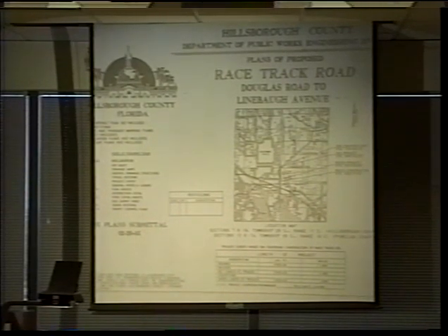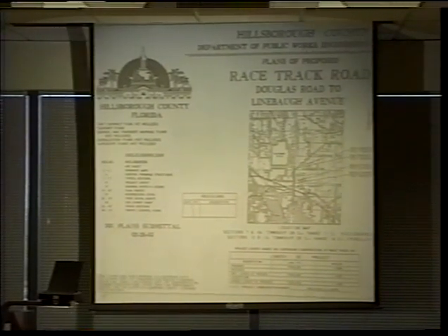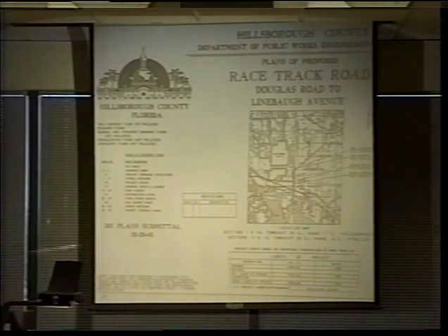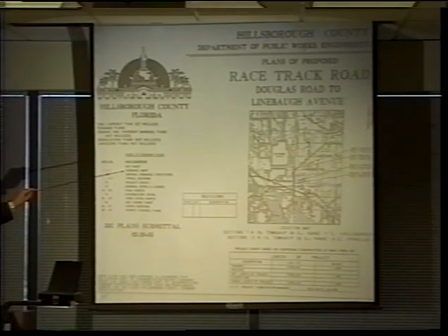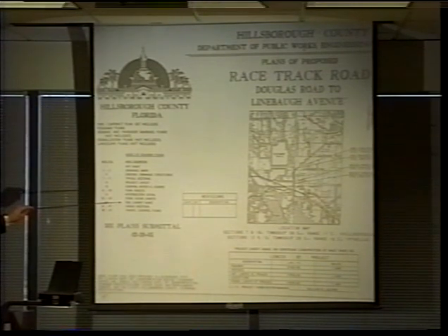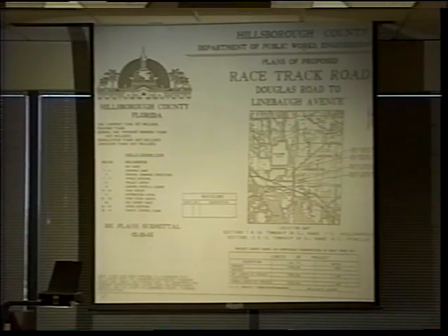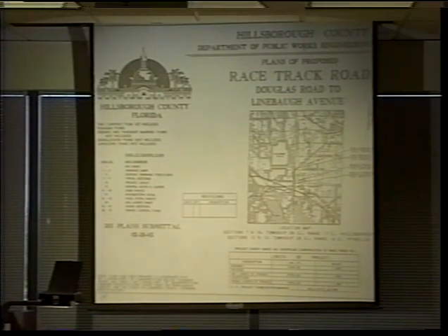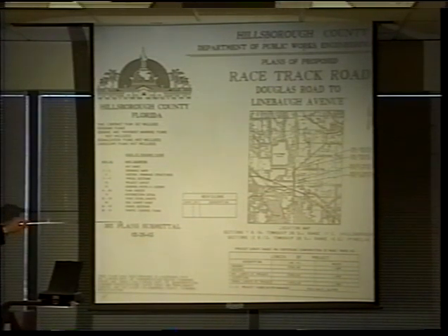The length of the project is down at the bottom. The location of it, section, township, and range is in the graphic in the middle. Over on the left-hand side is an index. Many of the particular plans that we just talked about are indeed included in here, as well as others. There's a soil survey sheet, and there are intersection details. What's noteworthy is that this particular set of plans clearly discloses the status of it, it's 30%, and the date it was determined at 30%, February 28th.